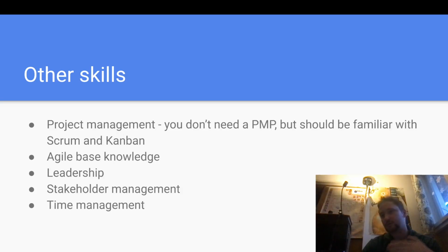And also to recommend to someone, if they're new to Jira, to either choose the project that is having a template of a Kanban or the project that is having a template of Scrum. And if they're saying, my team is estimating tasks, they like to have everything figured out by themselves, and we're spending a lot of time on planning about the issues and things like that. So you already know when they're saying those words, you can say, oh, the best one is a team-managed Scrum project for you.